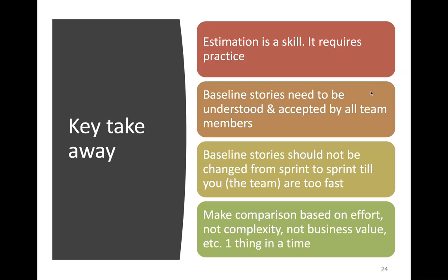Another point is to make the comparison based on effort, not complexity or business value. If we compare with complexity or business values, we are again going to fail with respect to estimation.